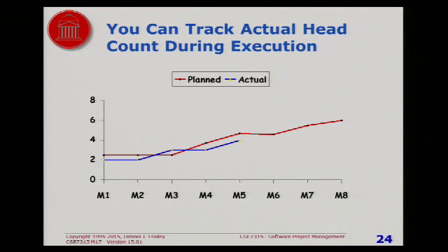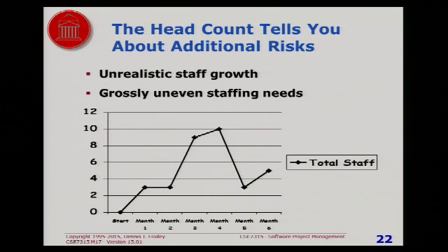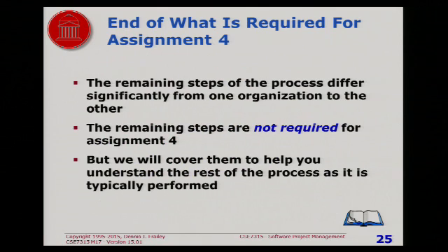But anyway, by the way, how do you change from here to here? You use the generic schedule. That's what the generic schedule is all about. You up the percentages in some months and decrease the percentages in other months as long as the total is 100%. That's where you change the things, and then all the rest of it automatically gets calculated out. That's the reason you have the generic schedule, so you can make those kinds of adjustments.